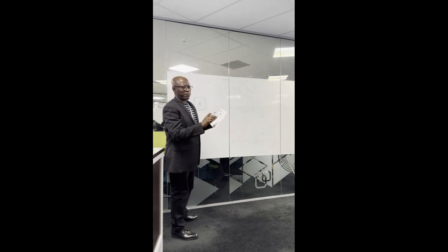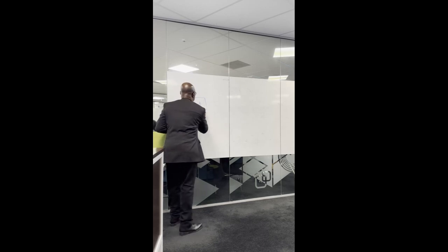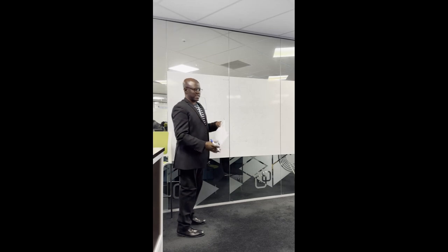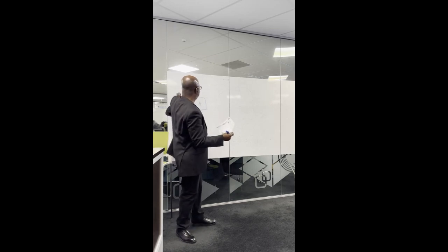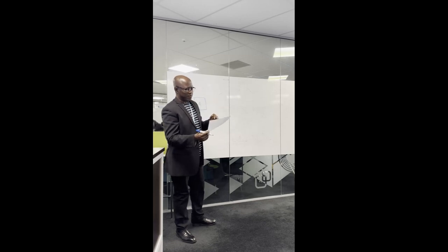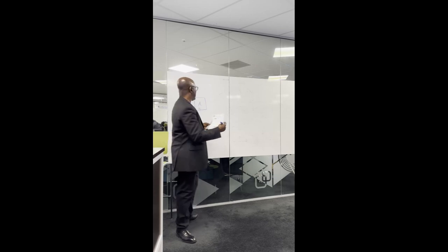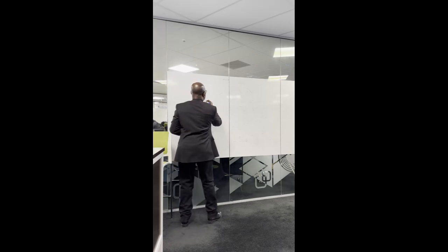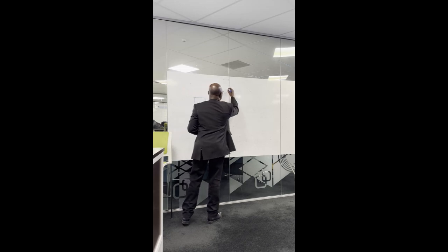If you look at your paper, it has 5 days of activities. We'll put our 5 days here. Because it doesn't have any predecessor, we leave it like that. But if you look at activity B, which is called construction plan, it is preceded by A, meaning that activity B, we take off from here, right? And we create this for it.